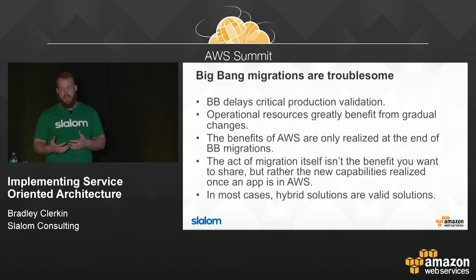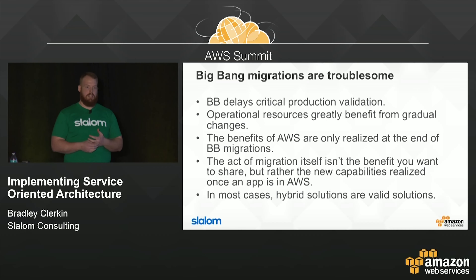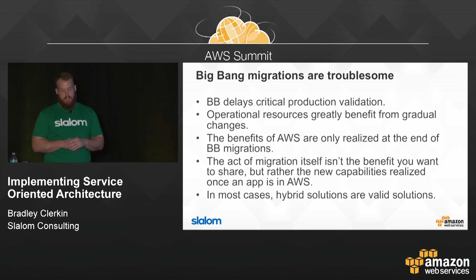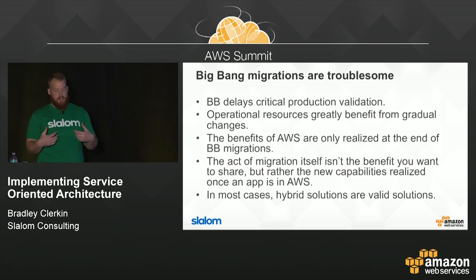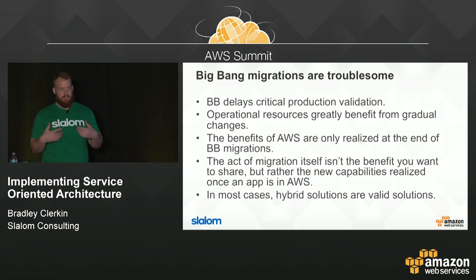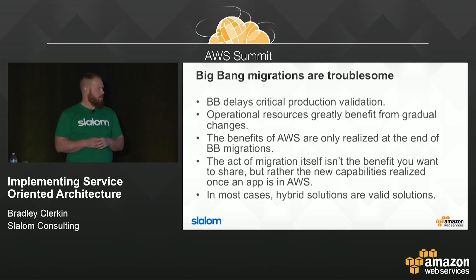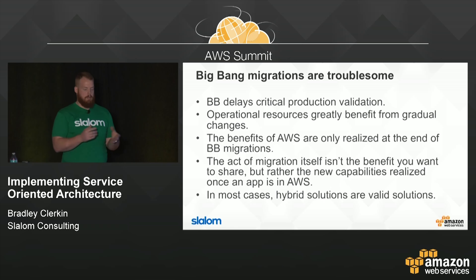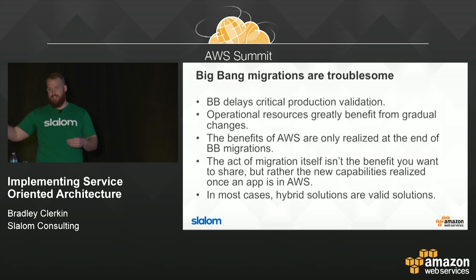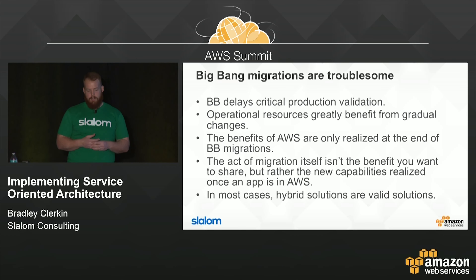Not only is production validation delayed until the end with big bang, but all the benefits of AWS might not be happening at a production level until the end. The actual migration project itself isn't the benefit you want to share — it's the new capabilities realized once you're in AWS. Once you get there, you're just starting. Why delay that? Big bangs probably come from the data center migration days where longest lead times were procurement and cross-connects, which could push migrations out years. But now we have a choice, so try to avoid big bang wherever possible.